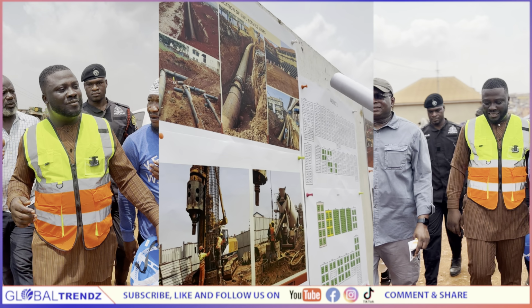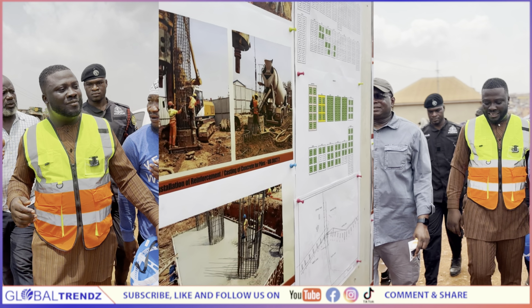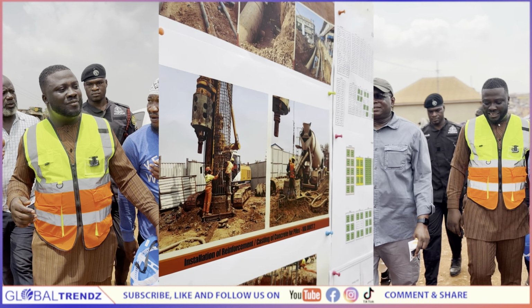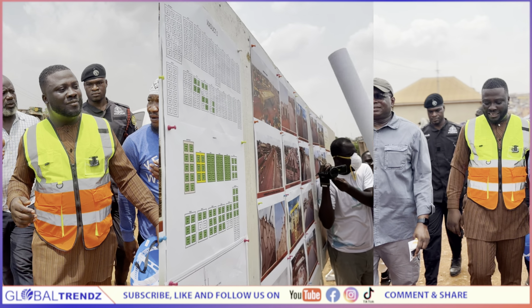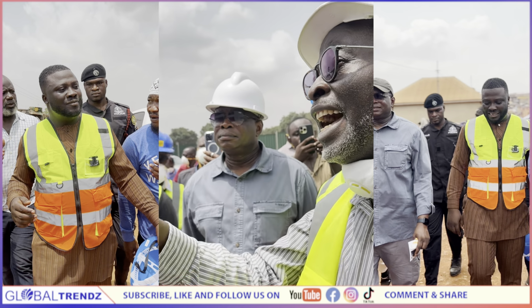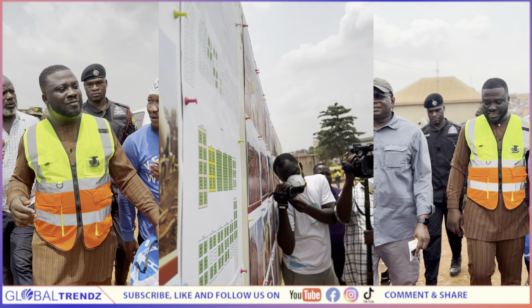This picture will show you some of the quantities of the pipes that we procured to site for that purpose. And this is just a relocation for a school. There is a nominated subcontractor. So when you look at viaduct 1, it has about 196 piles that the contractor has to sink. The contractor has done about 12 of them. Out of the 196? Out of the 196.